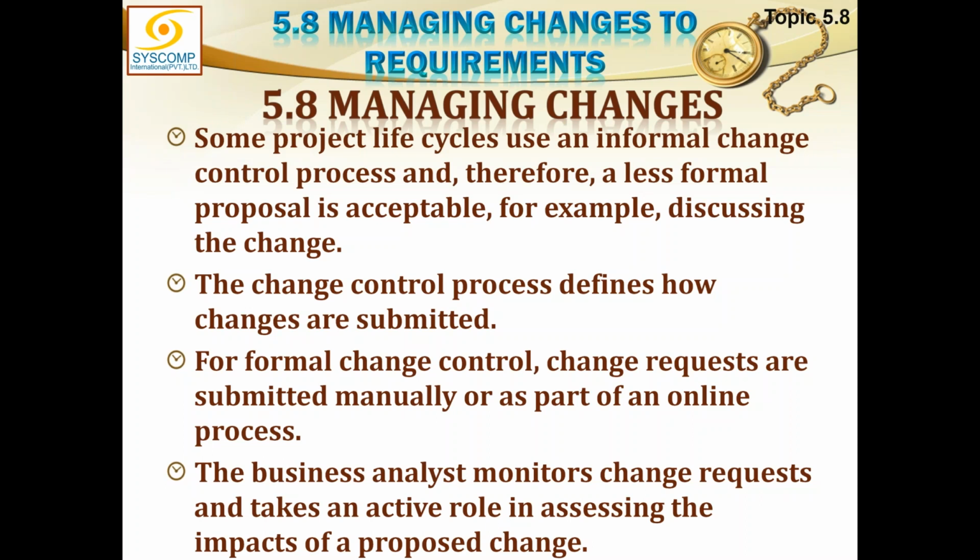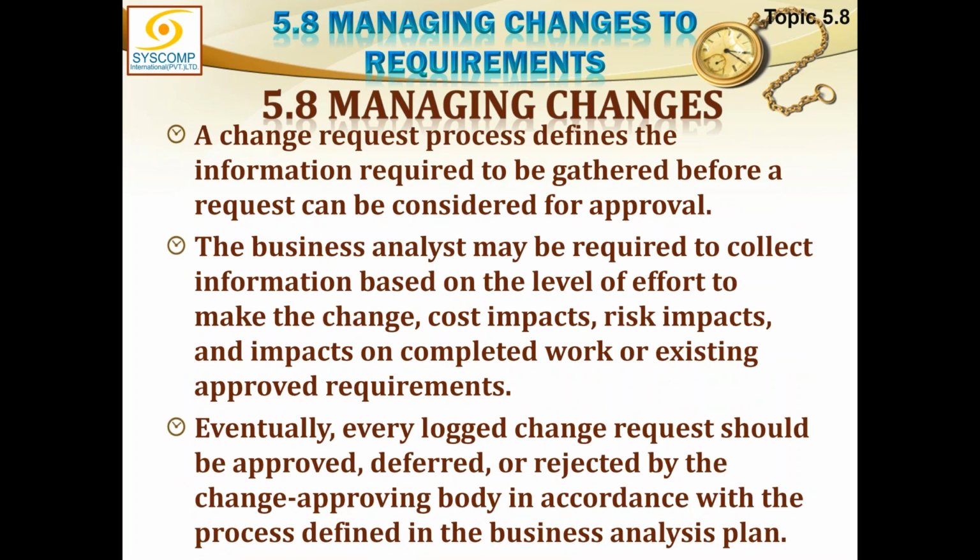Change control process defines how changes are submitted. The formal change control change requests are submitted manually or as part of an online process. The business analyst monitors change requests and takes an active role in assessing the impacts of a proposed change. A change request process defines the information required to be gathered before a request can be considered for approval.